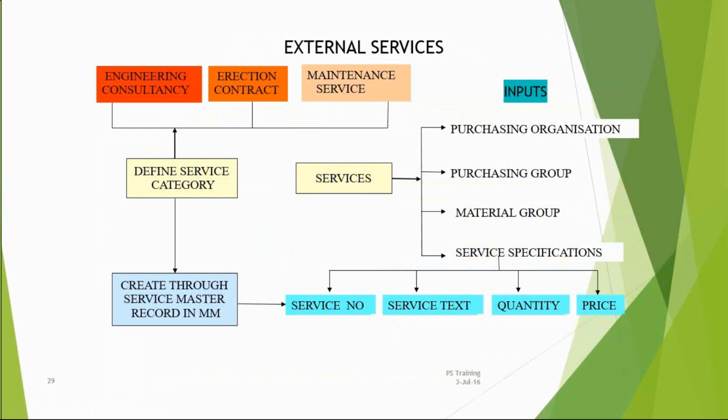Yeah, I understand. So in this case, let's say my commitment was $100 for 10 units, and then I have completed the goods receipt for the 10 units. Then my commitment is zeroed out, and the actual cost is increased with the goods receipt value. Here in this case, it's again $100, is it? Yes, exactly.